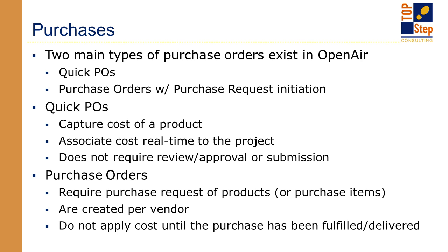Another way is to do a purchase request, which requests a purchase be created that follows an approval process and is then converted to a purchase order. And as the amounts are received and identified, the PO is fulfilled. Only a fully fulfilled purchase order becomes a cost against the project. So when reporting on it, it will only show you fully fulfilled purchase orders against projects.